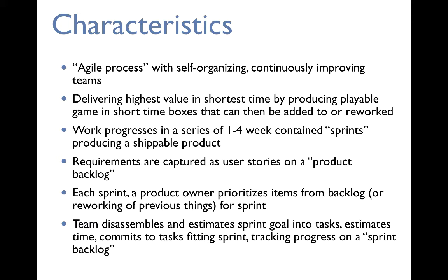That is, other project management tools focus on the individual things that you deliver and then estimate the time. Scrum says you work in a fixed time box and you try to fit something that actually makes the game more playable or makes the game playable within that fixed time box. And then after every time box you have something that actually works, and then you can add to that or you can rework it. So these time boxes are called sprints. They usually work on a cadence of 1 to 4 weeks.